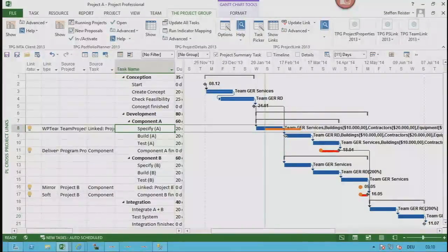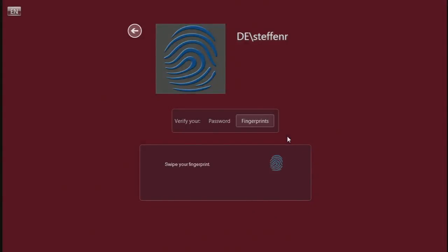What we do there is we collect every task out of these 50 to 60 single schedules which is supposed to be in SAP, bring that into a master plan, which does not have the levels which should not go to SAP, and then we post from that master plan into SAP, which has about 12,000 tasks in one project file. And all of them are rolled up from sub-projects.